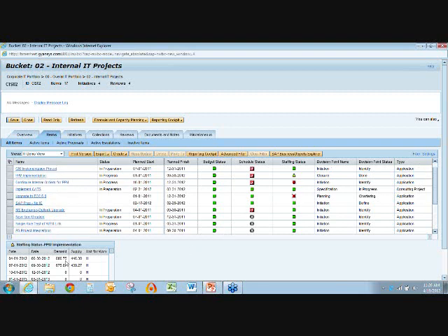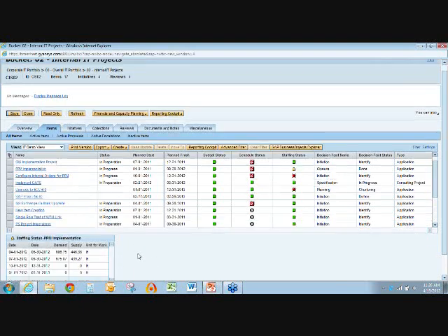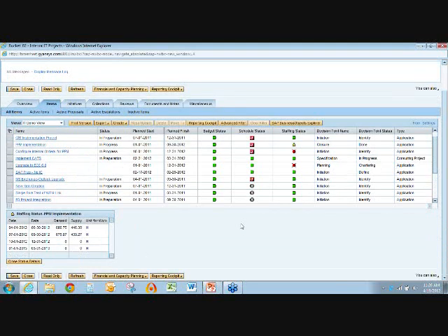Here we are starting in this quarter. We show demands about 686 hours, so we're a couple of hundred hours short on the supply side. So I know I need to bring in a contractor, or I need to shuffle around some other projects or resources to be able to accommodate these next 2 quarters. So I can very quickly work on that based on these indicator columns right on my dashboard in the portfolio.